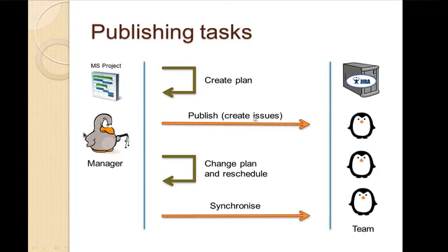At this point, the bridge creates these issues in JIRA and associates the issues with the tasks in Microsoft Project. Then the project manager can make some changes to the plan, and that can include some rescheduling of the tasks, and we can synchronize the data again to JIRA to update our resources with the changed assignments.